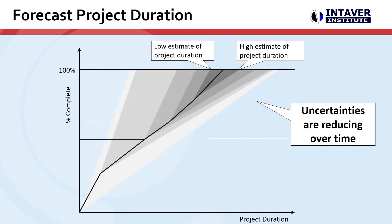Here we can see a visualization of the changing cone of uncertainty as we get further down toward project completion. We get an updated estimate of cost at completion and an estimate of schedule at completion. The cone of uncertainty and the range of uncertainty are reduced as we move through the project and gather more actuals and performance data in the system.